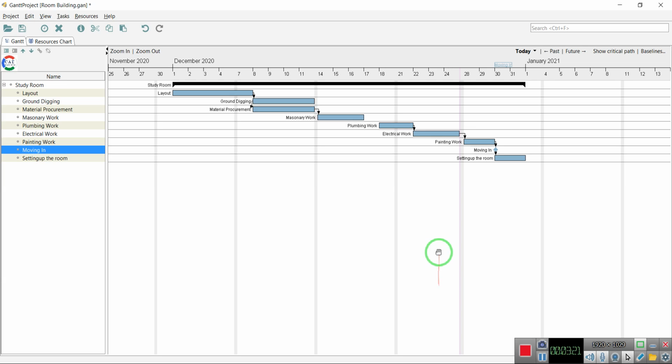Once that has been added, we can see a light pink colored strip that is coming just before the week off, that is Saturday and Sunday. Just before that, there is one day that is off and it is in a light pink color. So for that particular week, we can see that 21st, 22nd, 23rd and 24th, only these days will appear, and 25th of December is going to disappear.